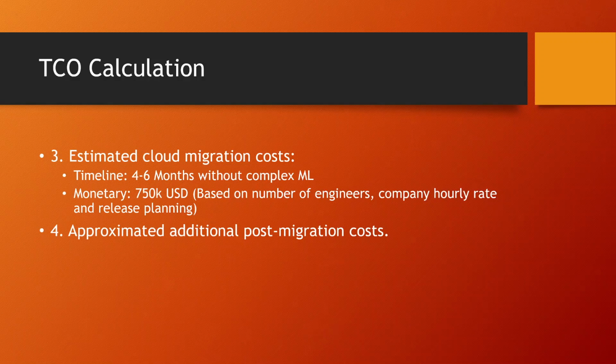across this month, and this is easier to calculate if we have constructed our timeline, because then, based on the number of engineers, company hourly rate and release planning, there's a simple formula to input this, and then you get the monetary expense to construct something like this.